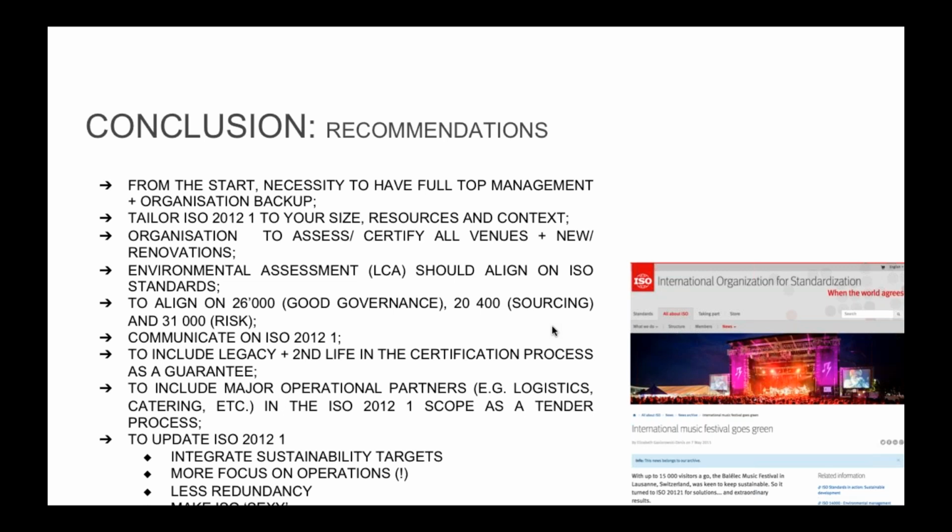And then one of my recommendations would be to include this within the tendering process for the major operational partners. We had a case at UEFA Euro 2016 where our major logistic partner went for ISO 20121, and that meant that we could communicate better, talking the same language, and then we were sure that what they signed, they would accomplish, because they were being audited upon and not just greenwashing all of their amazing things they were doing.